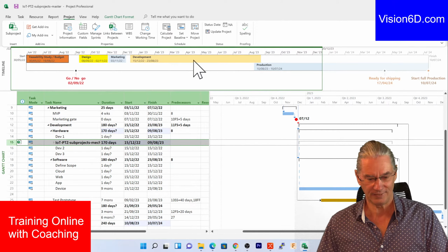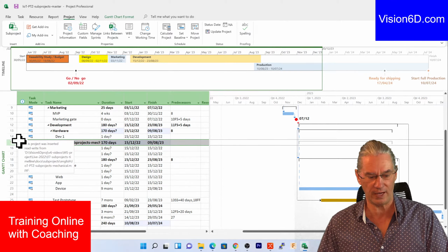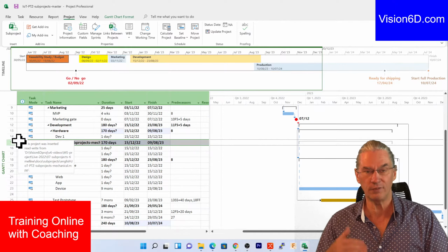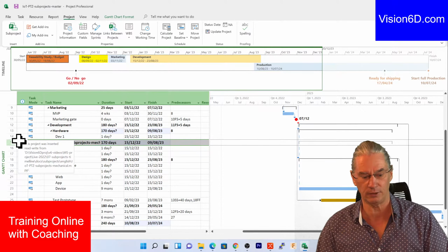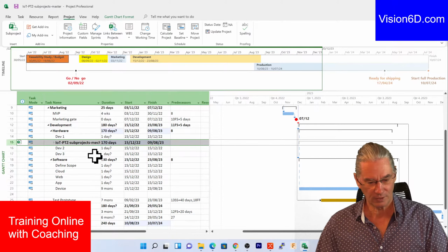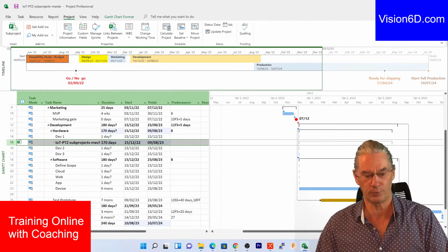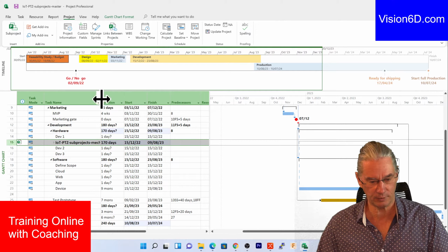And you see that here we have now a change. You see that on line 15, which is here, we have a new symbol that appears. It's a symbol to show us that there is a file that is now linked to this master file. And if you read down, you can see that it is the file that I was showing you, the mechanical one. With that, we see that here we have now the name of that project or sub-project. So here it's the mechanical part.